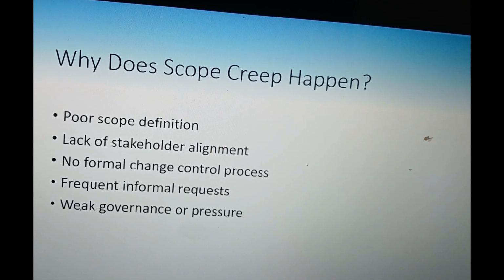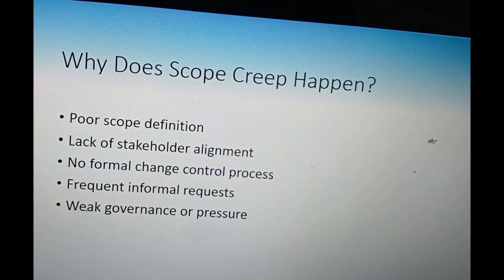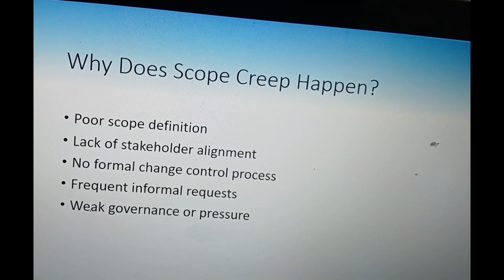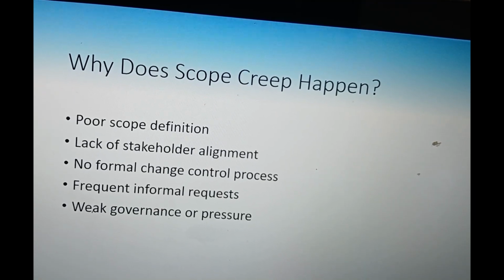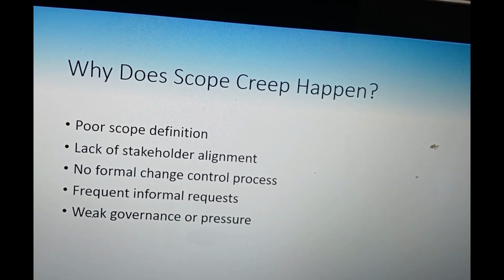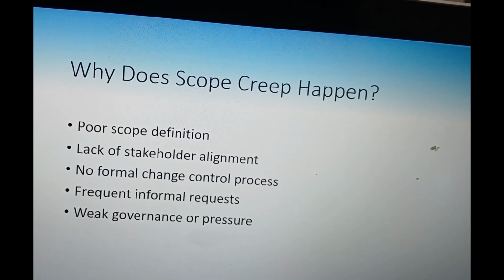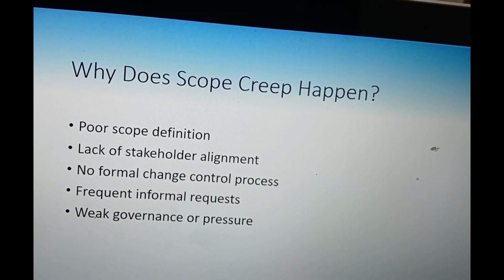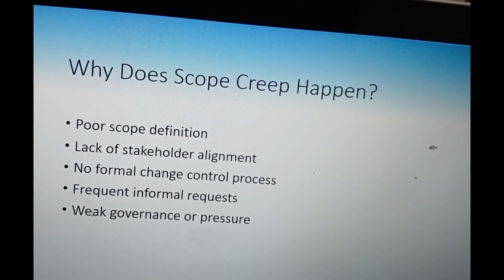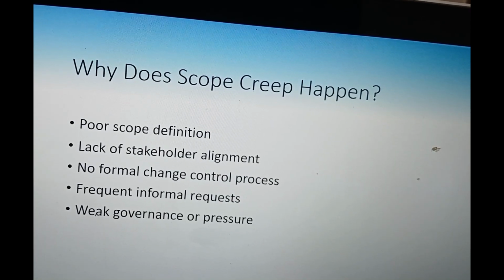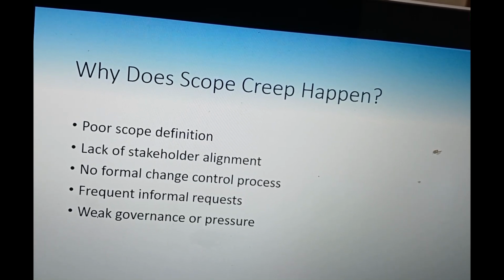Normally, in project management, we are told if you want to make any change, you cannot make that change on your own. You need to consult, you need to engage. And there is a special body known as change control body, a team that looks into the proposed changes and provide a go or a no-go.